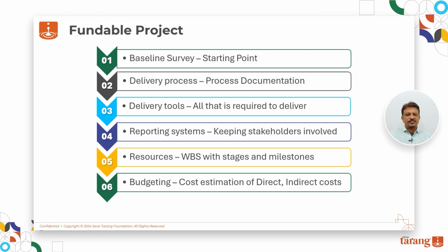Once you have a list of tasks, its owners and the tools required to complete those tasks, cost estimation based on the resource requirement and the proposed project timeline could be easy, as all you need to do is put those requirements in a matrix. This also makes it very easy to understand and analyze once the project is put in a spreadsheet.